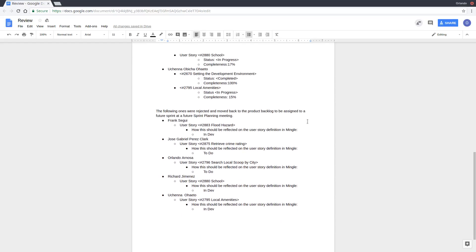Again, UserStory 2883, which is the flood hazards, 2880, which is the schools, and 2795, local amenities, those three will be carried over to the next Sprint.